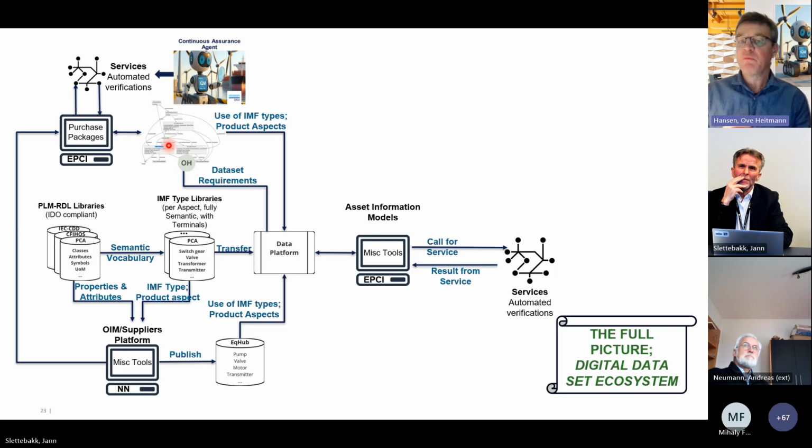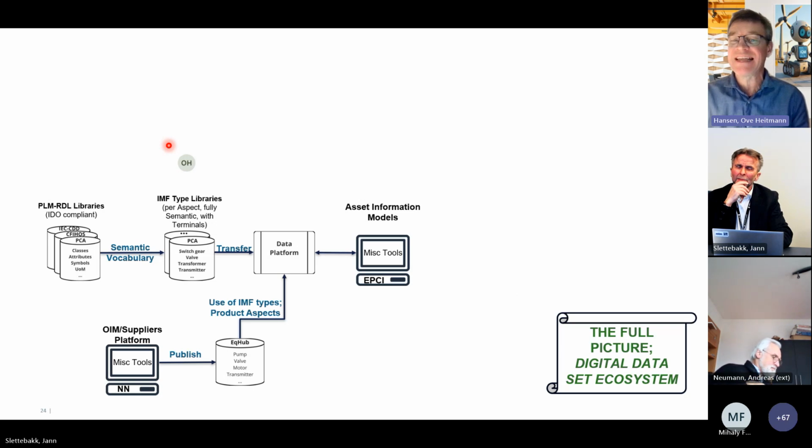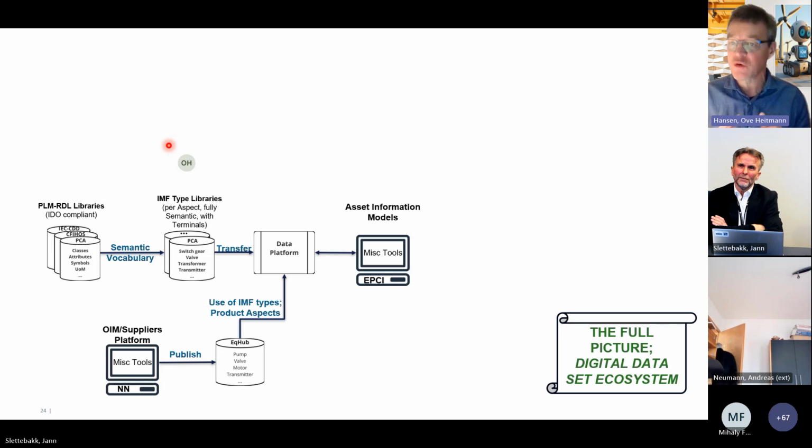So when we have built a plant or built some processes as such, we would like to test this out and make sure that this is actually working according to the specification or design requirements. Our vision is that if we create a full model that represents something physical that we have built and constructed, we would like to perform a digital commissioning on this. Meaning that we can do commissioning on a digital representation, a digital asset information model.